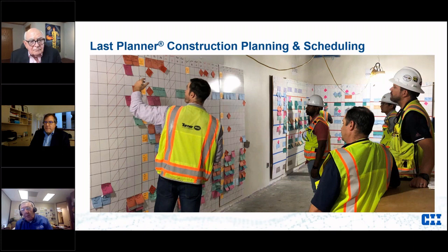And what we found is nobody, and I mean nobody, in the design world or engineering world wants to read a Primavera schedule. It just ain't going to happen. So you've either got to make it visual, either with some kind of an easy to read spreadsheet that will sort out their tasks for this period, or you've got to have something visual on a board if you want them to interact with you.